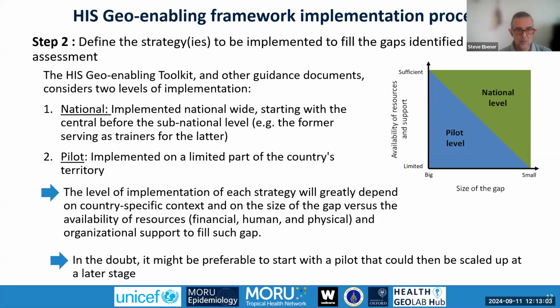Of course, the level of implementation of each of these strategies will depend on the country-specific context, including the size of the gap versus, of course, the availability of resources to fill this gap. And what we generally do, if there is a doubt in terms of the feasibility of a national implementation at first, is we always prefer to start with a pilot, which can be scaled up, with the additional advantage that the pilot might help reveal certain things that were not known previously or identified during the assessment.